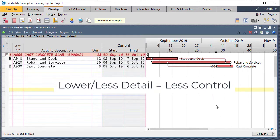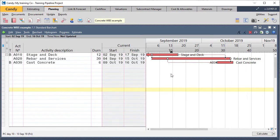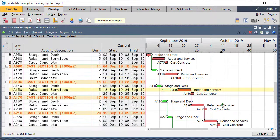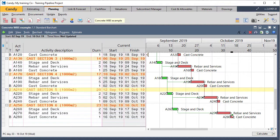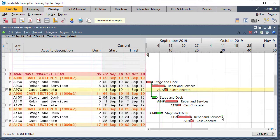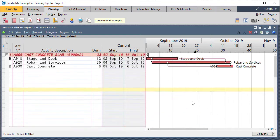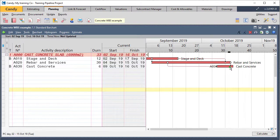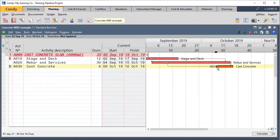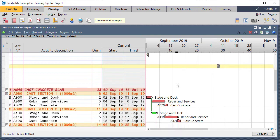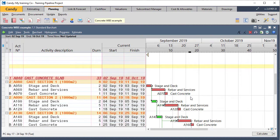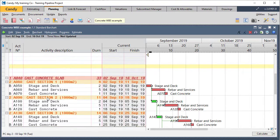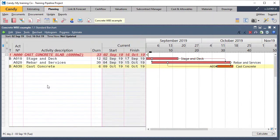It's also sometimes not completely accurate because we can send these concrete pour dates to our particular subcontractor or supplier of concrete. That just makes a lot more sense to prepare for those days we're going to cast concrete. In this example, there's nothing wrong with my links. It's logical, it's 100% accurate. But if you look at the way in which the software spaces these items, it's not quite accurate that we're going to bundle our concrete right at the end. And in Candy, you can't split the task like Microsoft Project. So this level of detail would definitely then not facilitate an accurate schedule for us to monitor and control this project. We need the breakdown into more detail in this particular case.